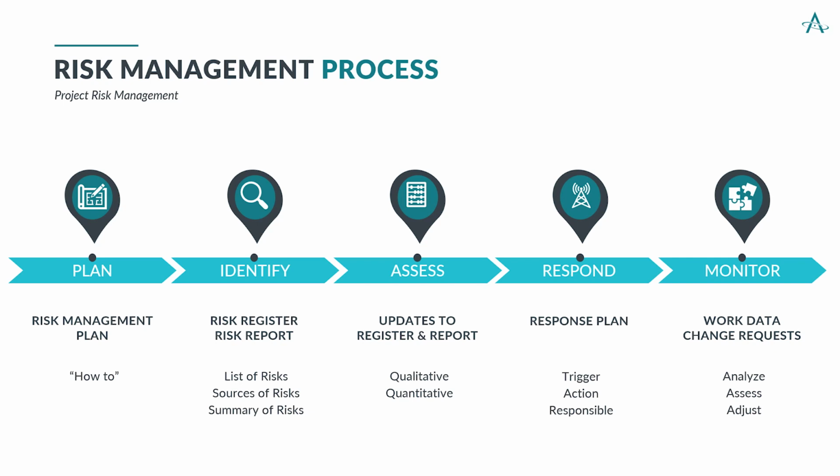But how often do I do this risk identification and monitoring? Well, I do it according to the risk management plan. As you can predict, the more perceived risk, then the more often you'll want to do your risk identification. What type of projects might incur more risks? Definitely projects that have never been done before. So when it's definitely a new idea, there's definitely a lot more risk. So you probably want to increase the number of times you do the risk management process.